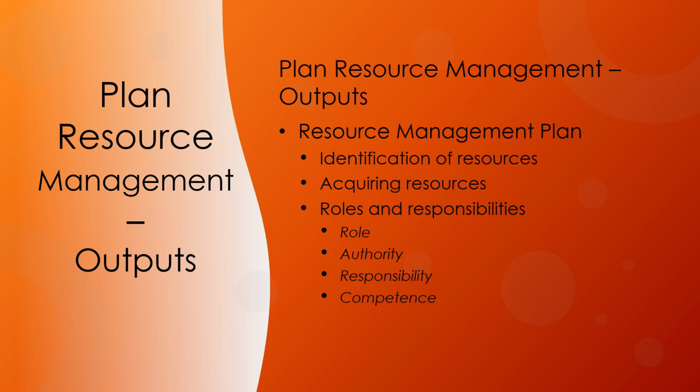Competence is the skill and capacity required to complete assigned activities within the project constraints. If project team members do not possess required competencies, performance can be jeopardized. When such mismatches are identified, proactive responses such as training, hiring, schedule changes, or scope changes are initiated.